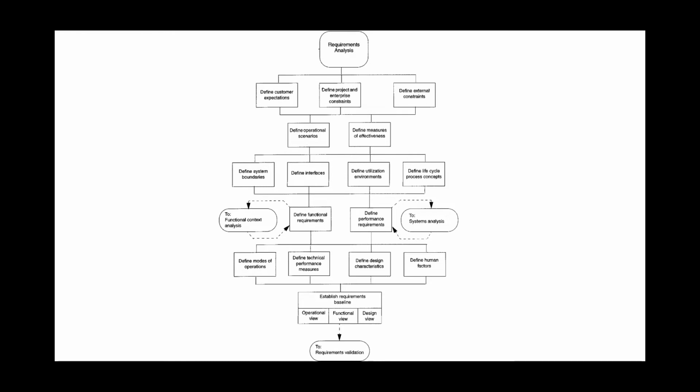And like I said, it's about designing, informing, and then coming up with the final baseline. You realize that, okay, we did our preliminary design, we had system requirements, we did our preliminary design, and now we know what we are designing, because this is the point where we have enough information to go forward and do design and construct. And that's where you draw a physical product baseline, and a baseline where you can look towards and verify and validate.